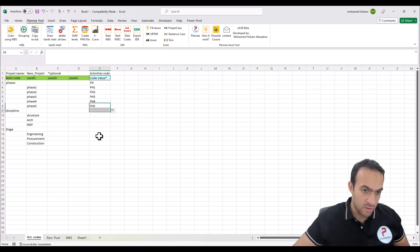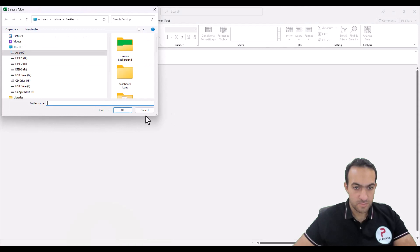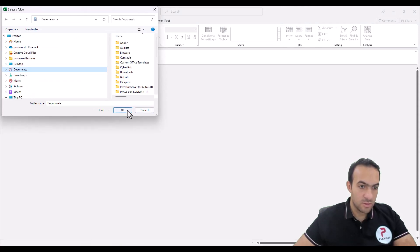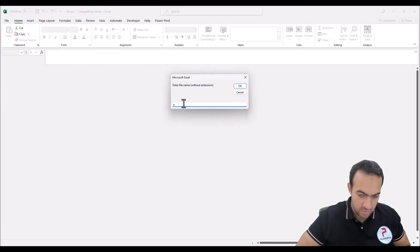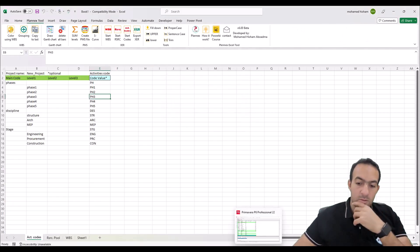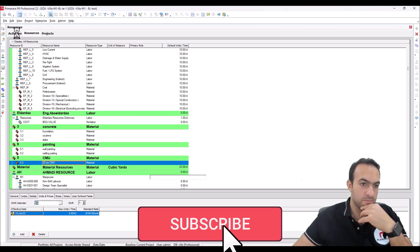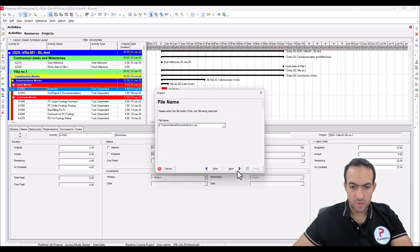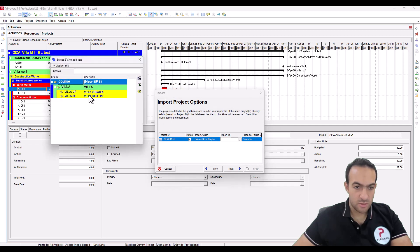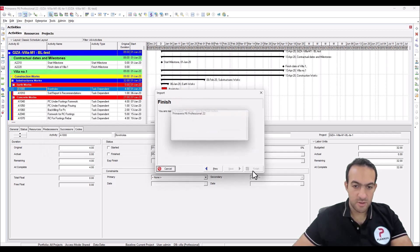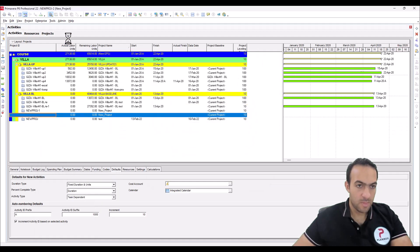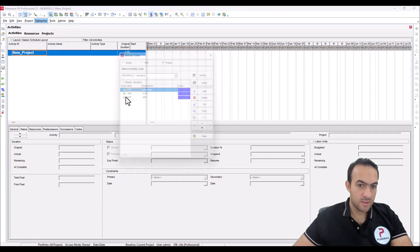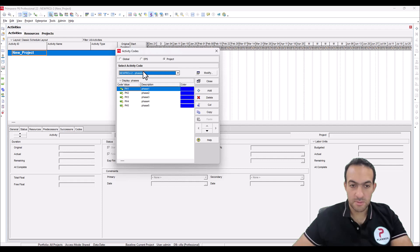I will add it here. Let's export to XCR — go to Documents, I will write 'activity'. In Documents again, you have two options: import as a new XCR project. Let's select the second file and create a new project — next, finish. Let's open this new project, go to Enterprise, Activity Code, and here is your activity code with the proper code values.